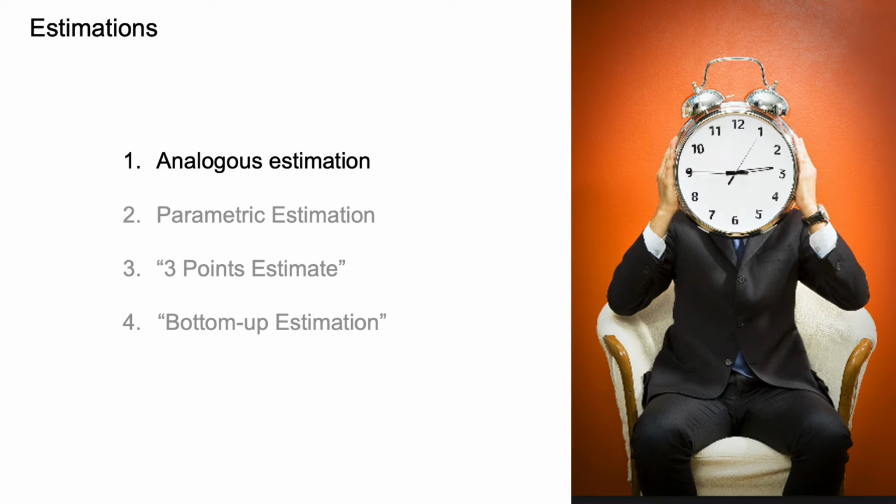For example, you developed a landing page for a site a few months ago, which took 2 weeks, and now you are responsible for developing a new similar landing page. You can estimate that the duration of this activity will be 2 weeks. The same applies to cost estimations.